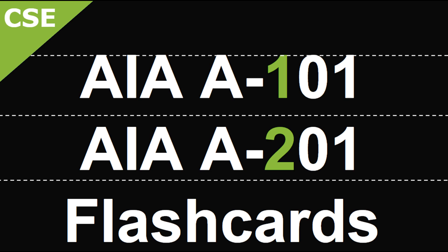What are two important dates expressed in the AIA A101 contract? Two important dates expressed in the A101 contract: number one, date of commencement of work; number two, date of substantial completion.